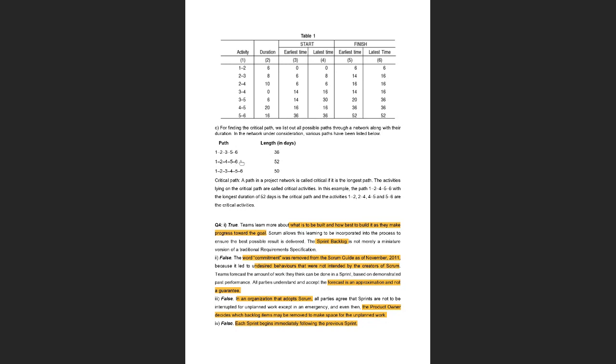We make sure that all the activities that lie in the critical path are taken care of and there is no delay in them, in order to avoid any delay in the overall project. There is a minimum time we require to finish the project, at least that amount. This is the earliest finish time required for the project, or in other words the project duration. This number dictates the time at which the project can be completed.